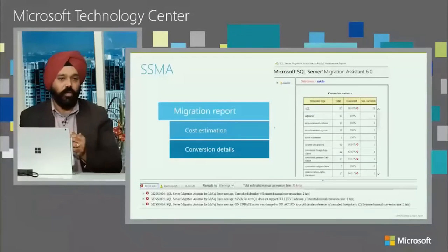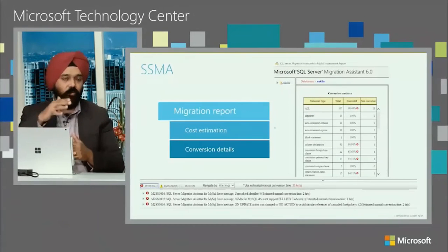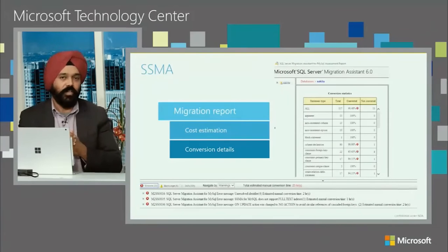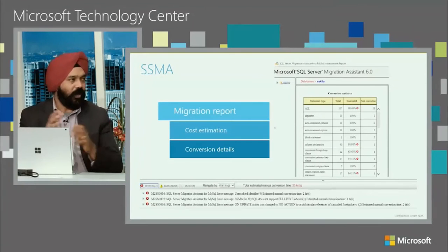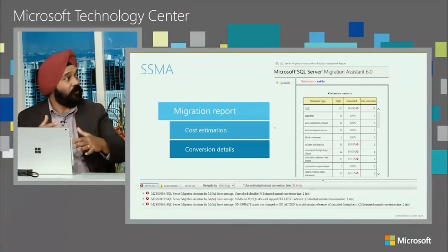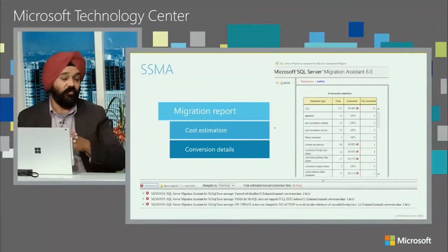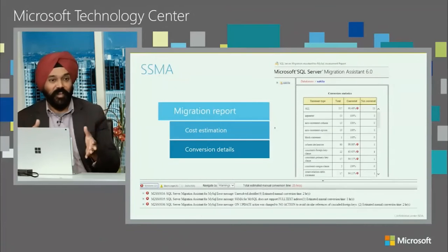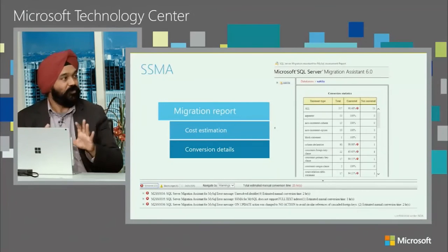Yes. Absolutely. And then you can get really, really good at it when it comes to the medium complex and high complex migrations. Typically, as a rule of thumb, Kevin, we have seen that we can cut the number of hours that SSMA has estimated by almost 50%. Really, so in half. In half. So I would just tell customers that when you look at the report from SSMA and it comes up with lots of hours to convert, don't panic.